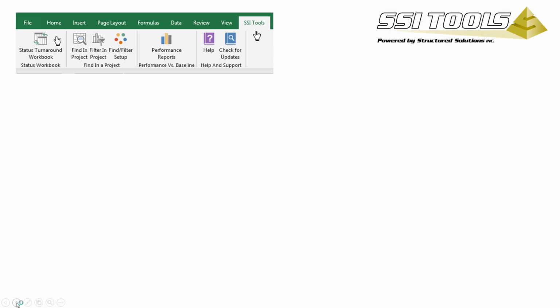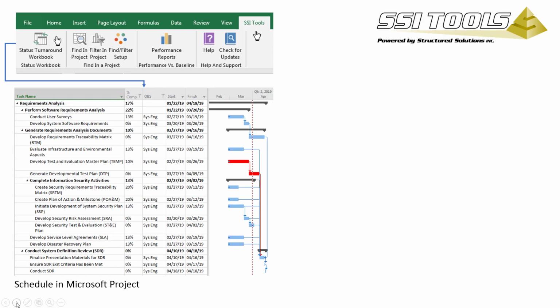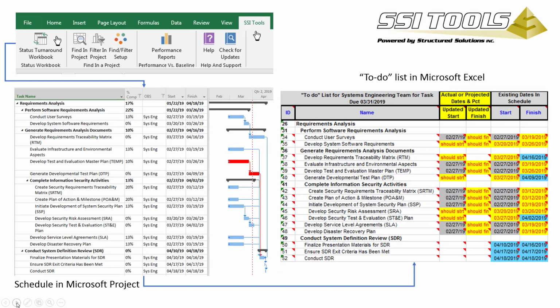Good day everyone. This video covers SSI Status Turnaround Workbook tools, which use data in your Microsoft Project schedule to create to-do lists as Excel worksheets for members of the project team. As long as you have the name of a performing or responsible manager or team member identified in any text field in Microsoft Project, you can use SSI tools for Excel to make simple, user-friendly worksheets showing the tasks due in the current reporting period. And if you like, you can even show future tasks as far ahead in the schedule as you want.